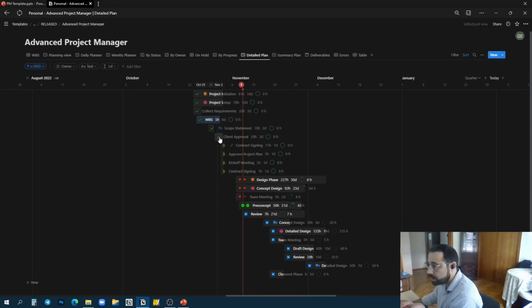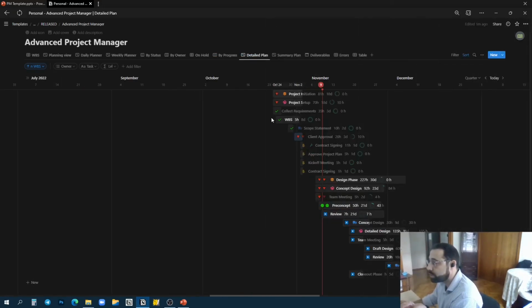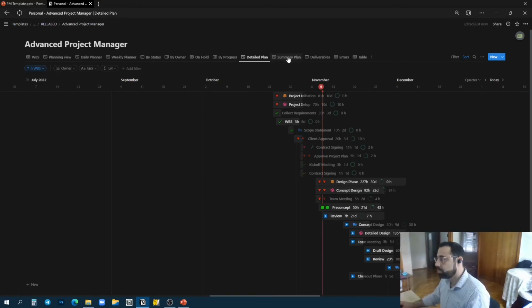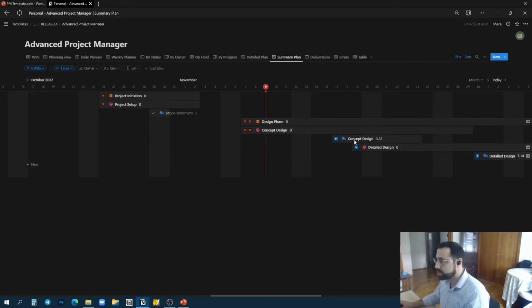Now, if I go here and let's say this one, the client approval is still not done. Let's say we spent 10 hours over it. You will notice that now this task is way behind schedule, but the project setup and the project initiation are slightly behind schedule. And the progress now is 39.8. The summary plan is the same thing, with the exception that it shows you just the overview, which is basically the parent tasks and the deliverables. Actually, not only the phases, but also work packages and deliverables.